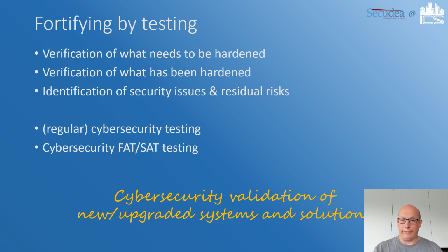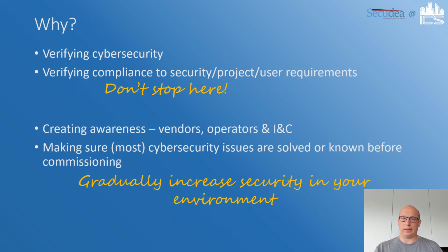Actually, cybersecurity FAT testing is one of the few times in an ICS environment where you can go all the way with your security testing, because it's in an isolated test environment, and then you can do full-blown cybersecurity testing at will. So cybersecurity FAT-SAT testing is the cybersecurity validation of new or upgraded systems and solutions within your environment.